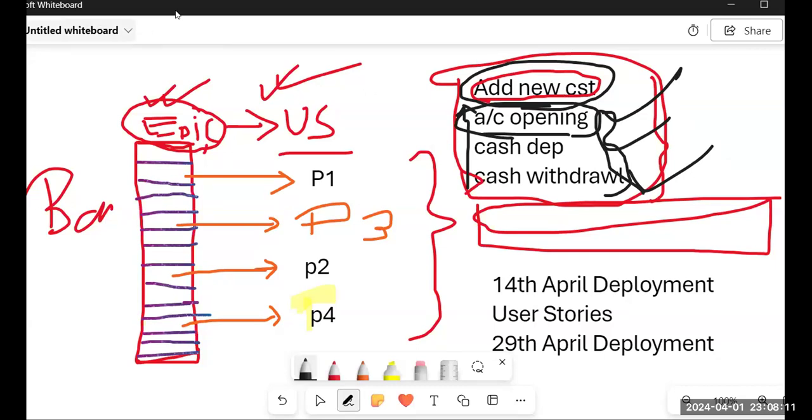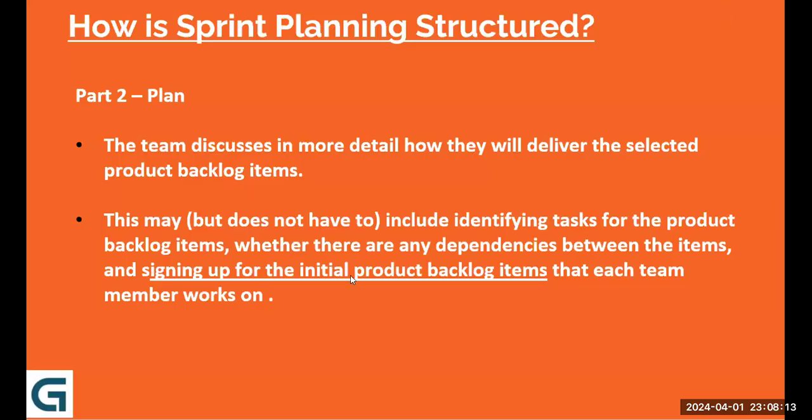Yes. So likewise, you need to identify the bottlenecks or dependencies and make sure those are always considered in the planning meeting and in the backlog item. And that's the reason you must be very clear that whatever prioritized items you have taken are actually prioritized and non-dependent. In case any dependent items are there, those have to be addressed first, that you are going to be very much sure of. With me so far? Yes, any question further?